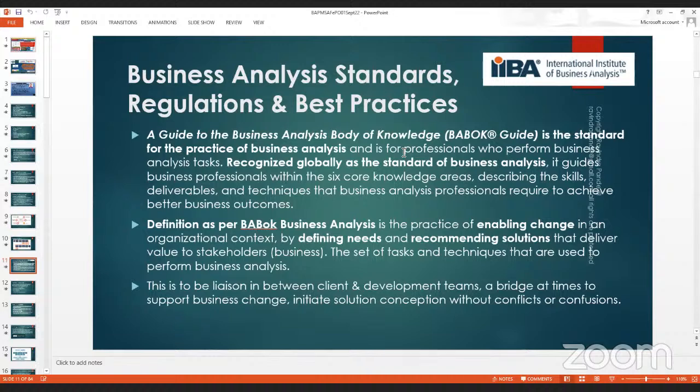So we do meetings, collect minutes of meeting, we find requirements out of these minutes of meeting, then these requirements are converted to a high level diagram. We can devise a use case diagram where we explain the complex requirement. We're going to learn and do hands-on practice for the use case diagram as well, and then we're going to move to a level where we should be able to conceptualize the solution.